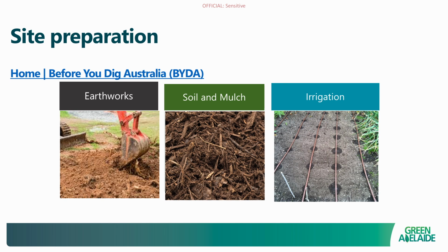So certainly make use of that resource to find out if there are services under your project site. But also, are you going to be removing any hard surfaces which radiate heat? If so, how much of that needs removing? If it's a small component, maybe you might go and hire tools, a jackhammer, and do it yourself. If so, how are you going to dispose of that waste? If it's a large site, then yeah, you might get a contractor in. So think about the costs, think about how that might happen, when that might happen. So investigate all those aspects around the earthworks.